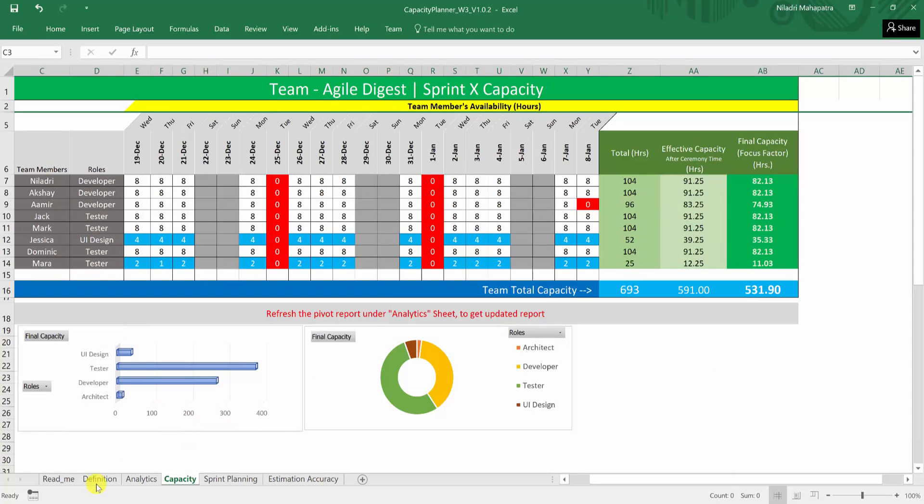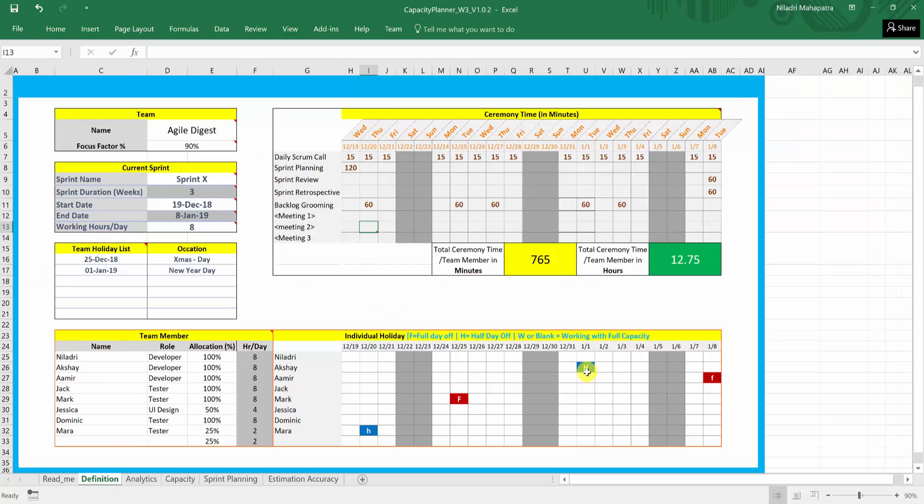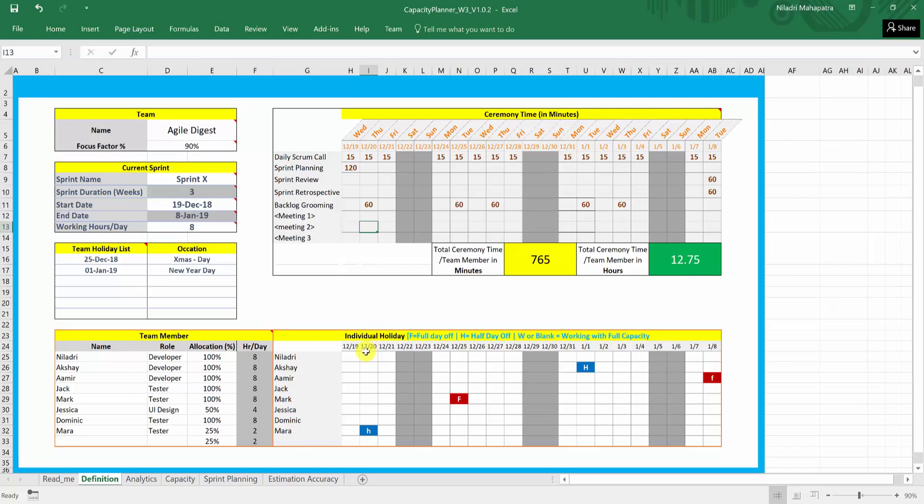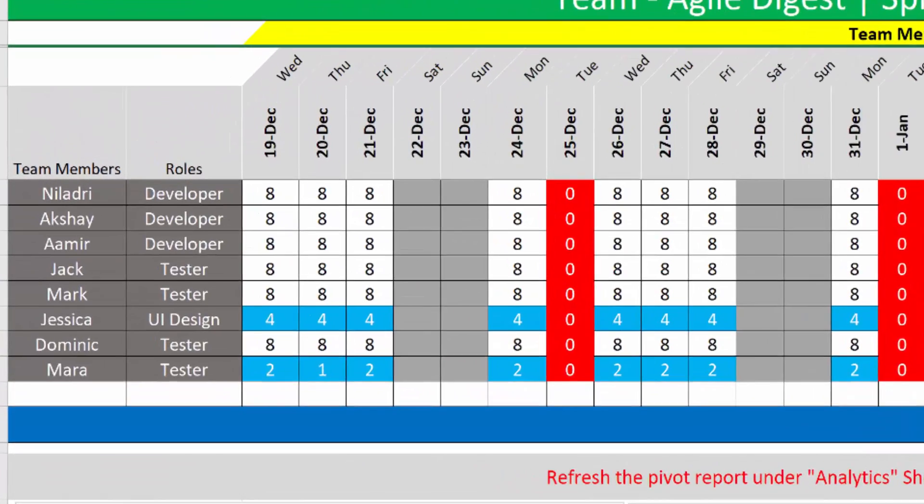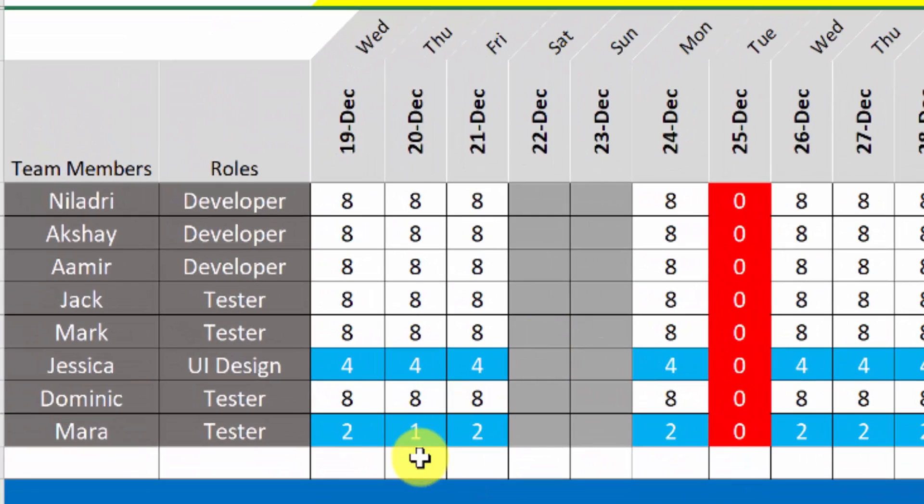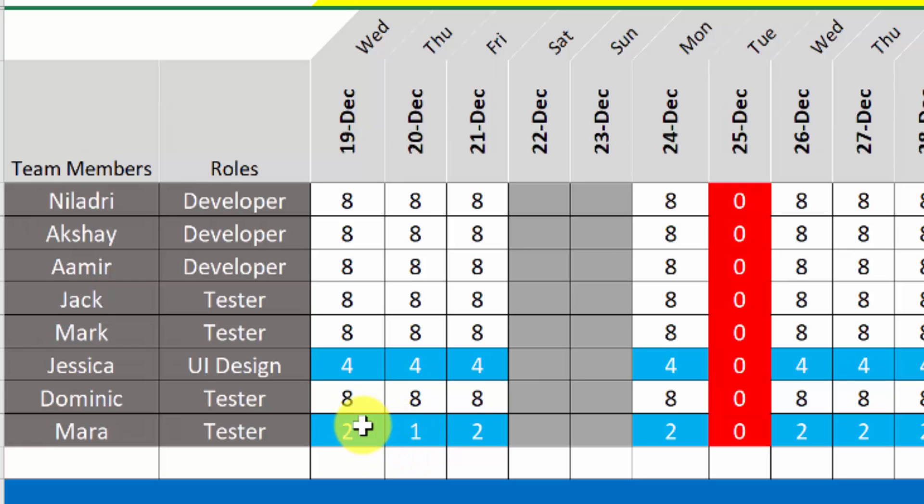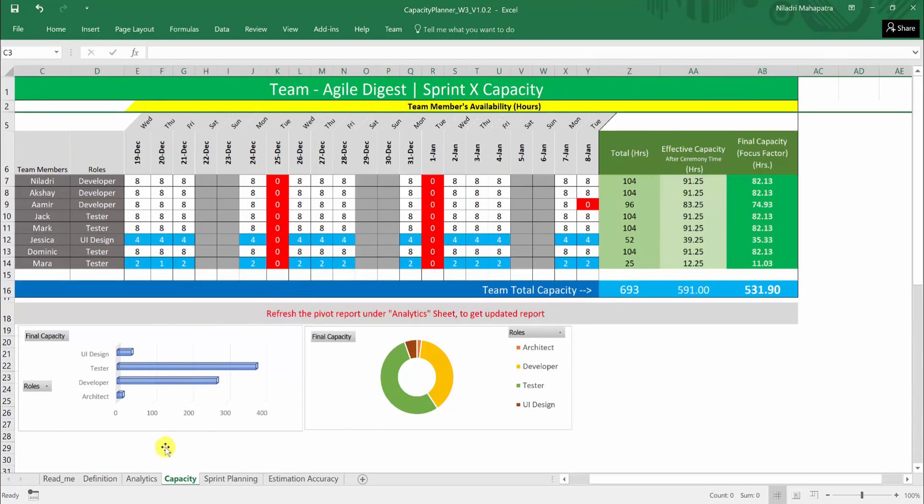There was one more half day we had defined for Akshay that is a first of Jan, but again that was a off. So it will again override by this first of Jan New Year. Mara also has taken a half day off on 28th. So if you are looking to see Mara's allocation is 25% based on the total number of hours, 2 hours is per day she will be working on. So on our capacity it will be showing 1 instead of 2 that is a 25% of 8 hours. So 25% is actually if you see half day every day 25% is 2 hours. If it is a half of that that means it is 1. We will make one more half day and full day to see how it is getting impacted here.